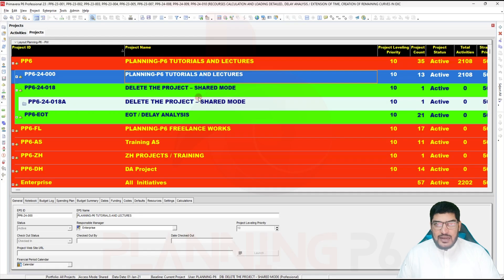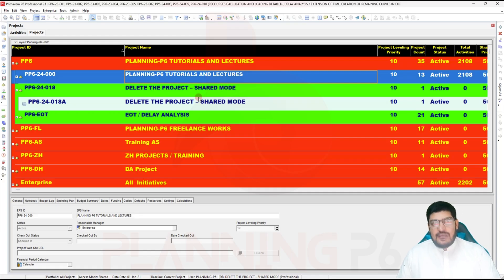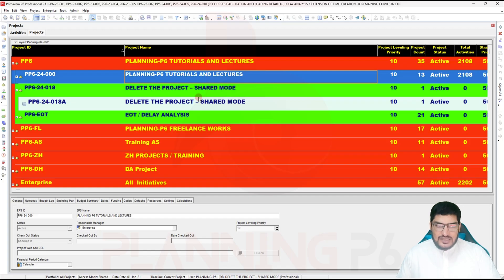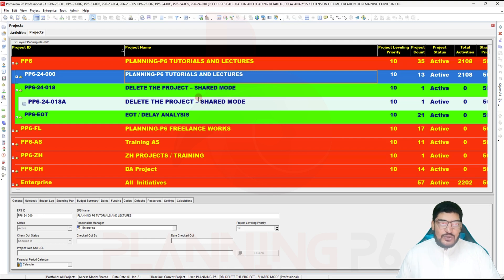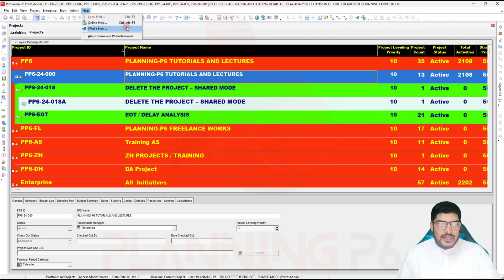On a monthly or weekly timeline, export your database as an XML file. If an error or issue happens in the database, you can still access all your projects. For example, if your update time frame is weekly or monthly, just after the update, take five to ten minutes to select all projects and export as XML — your projects will be saved safely.